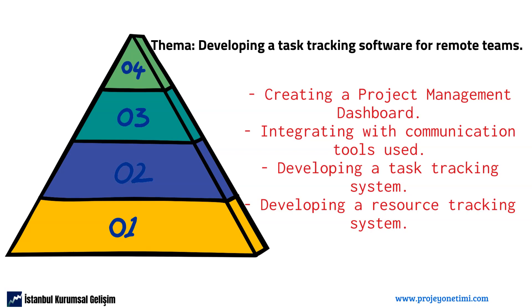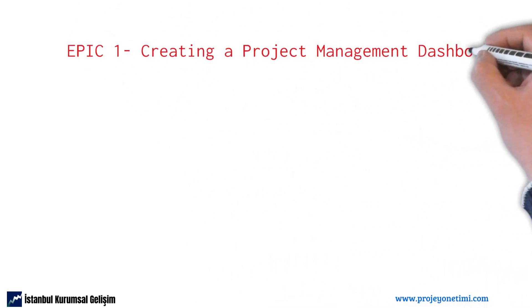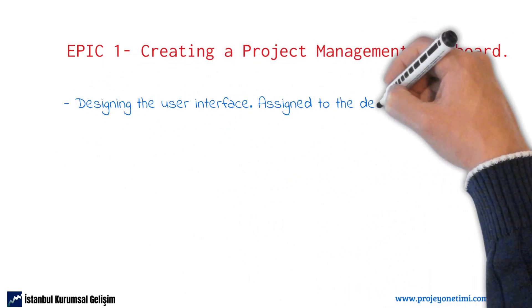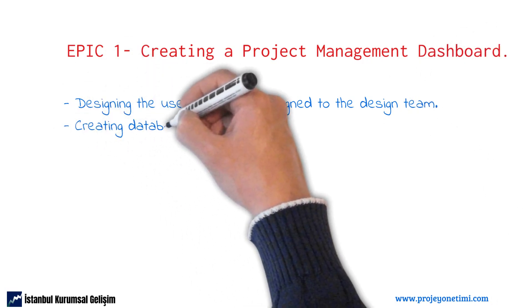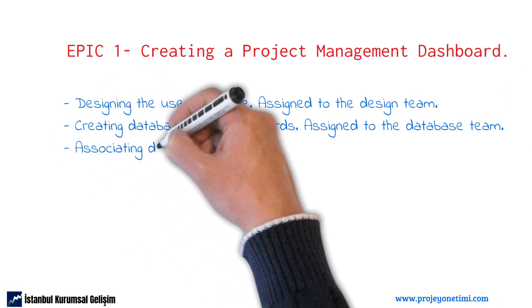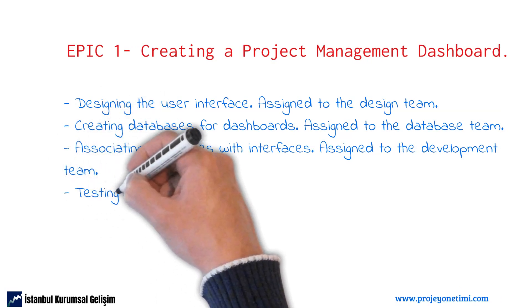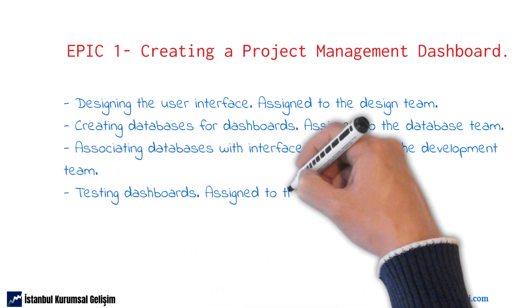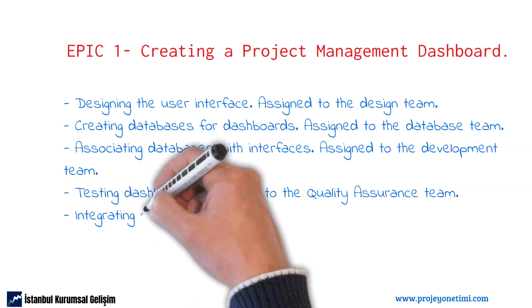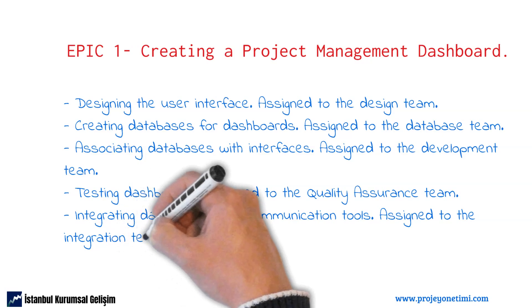For example, the epic 'creating a project management dashboard' may include the following user stories: Designing the user interface, assigned to the design team. Creating databases for dashboards, assigned to the database team. Associating databases with interfaces, assigned to the development team. Testing dashboards, assigned to the quality assurance team. Integrating dashboards with communication tools, assigned to the integration team.